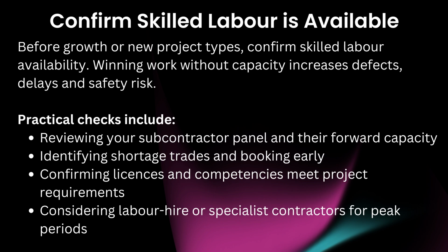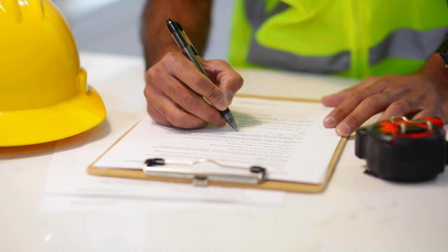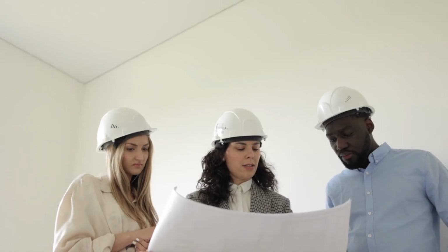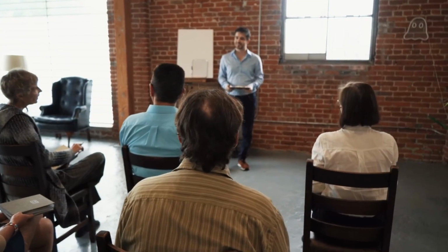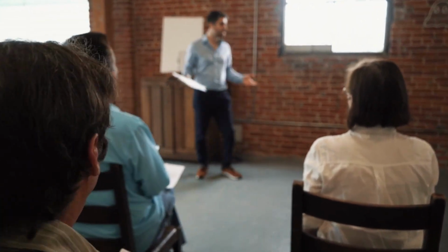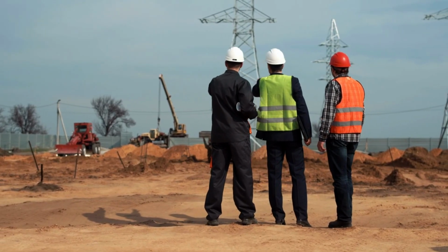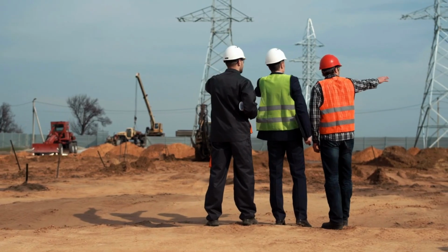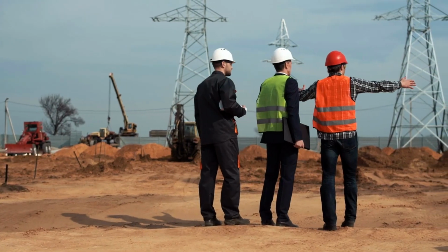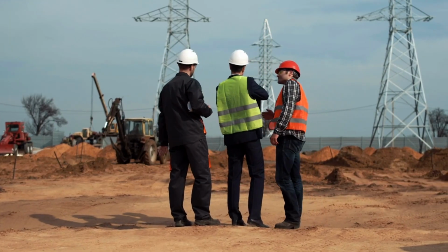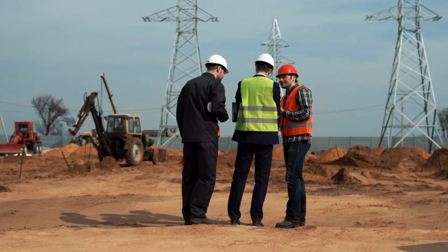Practical checks include reviewing your subcontractor panel and their forward capacity, identifying shortage trades and booking early, confirming licenses and competencies meet project requirements, considering labour hire or specialist contractors for peak periods, building longer-term pipelines through apprenticeships and training partnerships. Benefits of skilled labour include higher productivity and fewer errors, better compliance with specifications and the NCC, stronger safety behaviours and site coordination. Skilled labour directly protects time, cost and reputation.